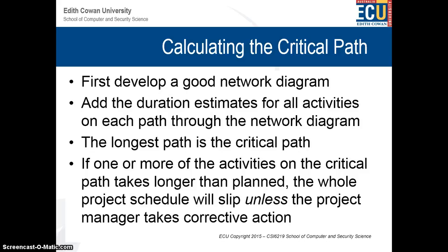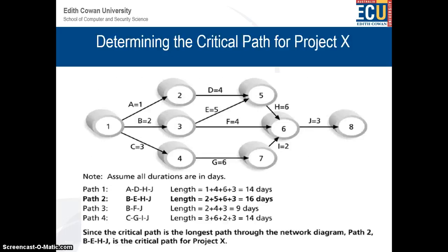Calculating the critical path. First, develop a good network diagram. That's a very important point. Add the duration estimates for all the activities on each path to the network diagram. That's true. The longest path is the critical path. True. If one or more of the activities on the critical path takes longer than planned, the whole project schedule will slip unless the project manager takes corrective action. Makes sense.